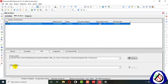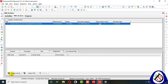From Public Location, you can also add files. If you save your file in Google Drive or any other drives or shared media, or any platform like Jandesk — any location with a shareable link — you can add that shareable link in the Public Location field and launch the document from there.